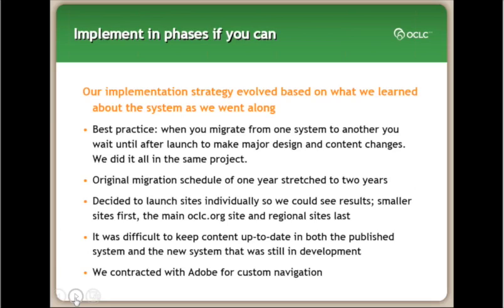Our original migration schedule stretched to 2 years, but we did get everything rolled out the way we wanted to. We used an agile project management process, and so I think for the first 6 months after our launch, we continued to add features, fix bugs, and really continue to improve the look and feel of the site.